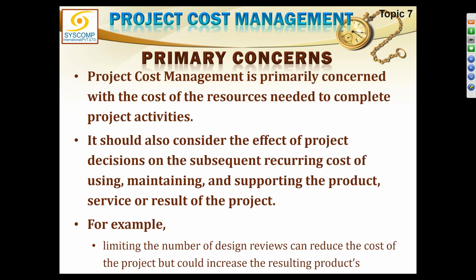It should also consider the effect of project decisions on the subsequent recurring cost of using, maintaining and supporting the product, service or result. If you are estimating something, the cost is very low in the beginning, but when the project is delivered, running that system would be very expensive. So is it a wise decision? This should have been done during the feasibility of the project. The project might cost less, but actually running that product will cost a lot to the organization. That is probably not a good project, and it should not be started.